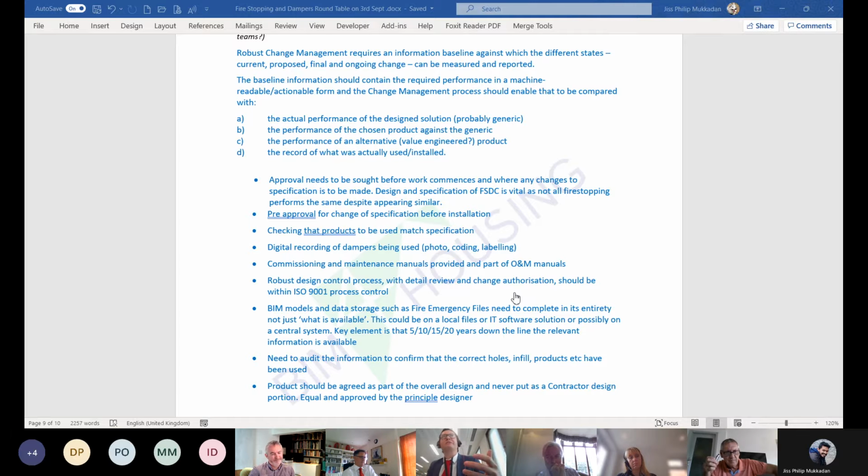And I think when you look at most of the contracts, they are design and build, where we are responsible for the adequacy, discrepancy and statutory matters of everything that's been done, including the pre-work of the consultant. If it's drawn wrong at planning, you're going to get a regulator beating you up, as well as a client with a contract, because things aren't adequately to be installed to statutory compliance. So that's what we're going to find. That's my fear with it.